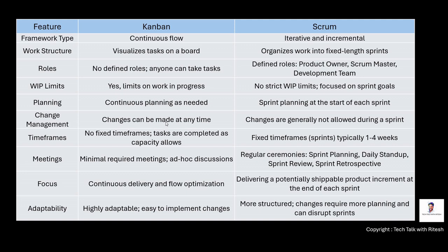So that is not a good use case for Scrum team, because Scrum work is already decided before the sprint starts, right? In Scrum, changes are generally not allowed during a sprint. So yes, time frame, no fixed time frame. Tasks are completed as capacity allows, and in Scrum we have fixed time frame, which is a sprint, typically 1 to 4 weeks. Meetings, minimal required meetings, ad hoc discussions, whereas in Scrum, regular ceremonies, sprint planning, daily stand-up, sprint reviews, sprint retrospective,